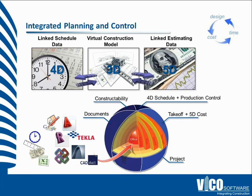The core of that is really the 5D data flow — using the model to drive both cost and time. The benefit of that is we can predict the impact of change. In any other system, whether completely traditional or glue-ware systems where you manually connect cost and time, this data flow enables us to predict the impact of change. So if you increase the length of a wall, for example, we're able to very accurately predict the impact that will have on both time and cost.